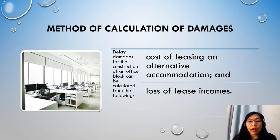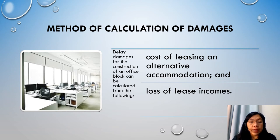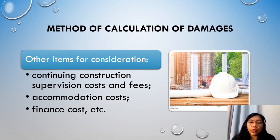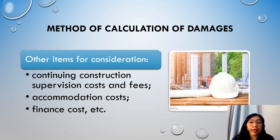For the construction of an office project, liquidated damages may be calculated on the cost of leasing alternative accommodation — for example, if the occupier of the office is the owner. However, if the office building is likely to be leased, the damages could be calculated on the likely lease income, similar to the hotel example. Other items to be considered in the calculation of damages may include continuing construction supervision costs and fees, accommodation costs, and finance costs if there is a loan funding the project. This list is not exhaustive.